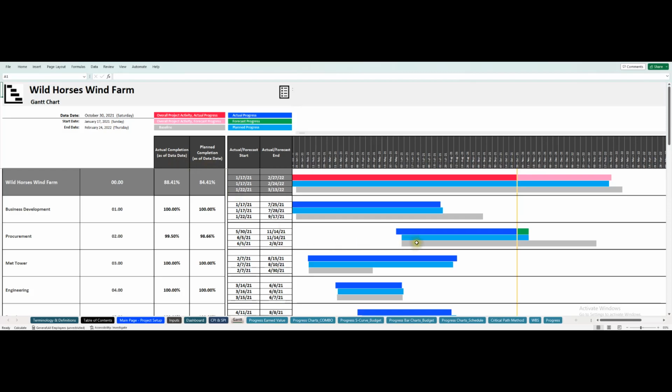So what that means is in a Gantt chart, when you have a bar like this, you show the start to finish timeline, but what you don't really see is the progress along that timeline. It is not a one-to-one, meaning day one is this percentage and 1% or whatever and evenly divided. It's various amounts of progress provided along the way, right? And that's why we also have the line charts here, right?